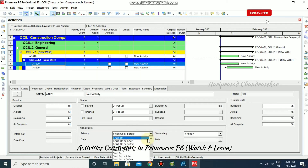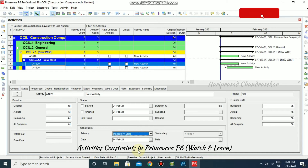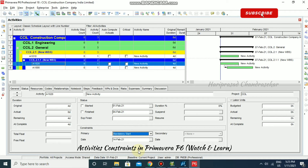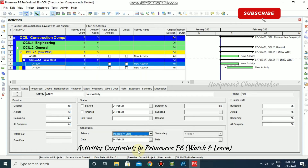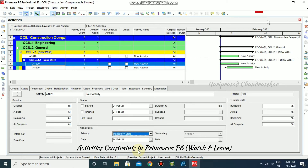We also have mandatory constraints. For mandatory constraints we have mandatory start — the particular activity must mandatorily start on a specified date, such as 14th Feb. This restriction sets the early and late start or finish dates equal to the date you specify. The mandatory early start or finish date is used regardless of its effect on network logic. A mandatory early start or finish date could affect the late dates for all activities leading to the constrained activity and all early dates for activities leading from it. When mandatory constraints are placed on calendar non-work time, the early and late start dates are not set equal to each other — the early date moves forward to the next valid work time and the late date moves backward to the first valid work time. This can cause negative float in the schedule.